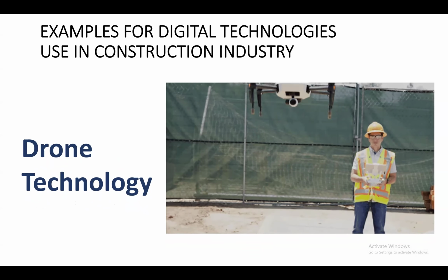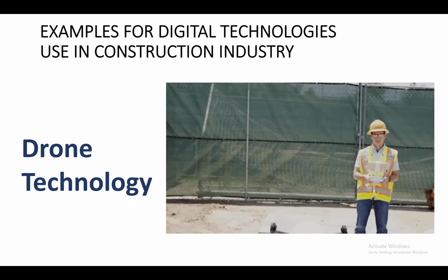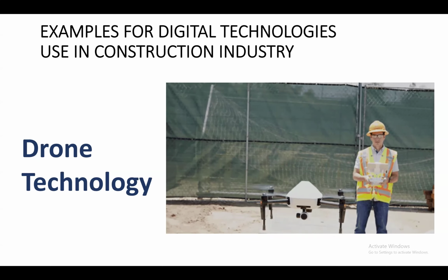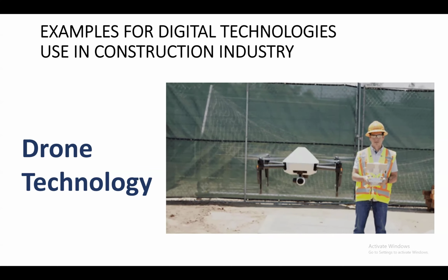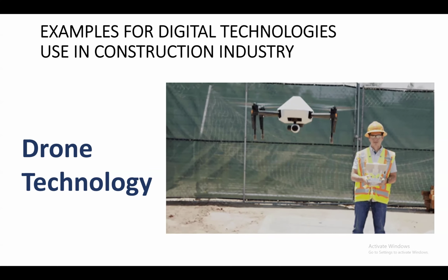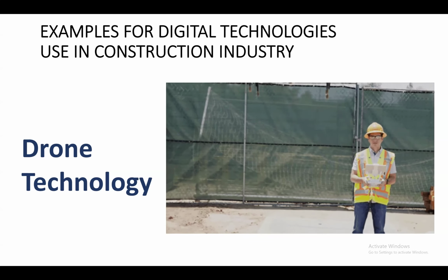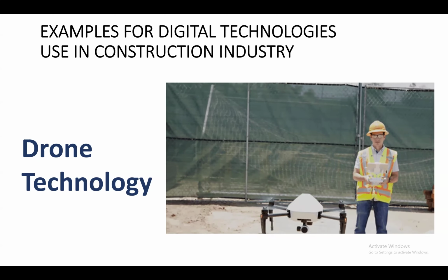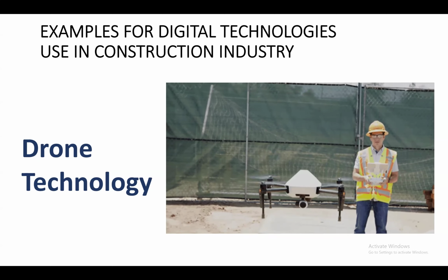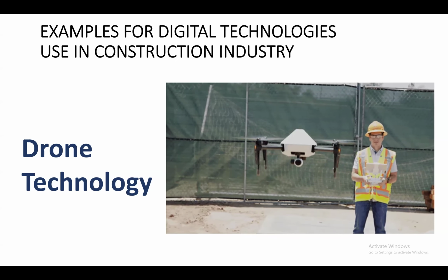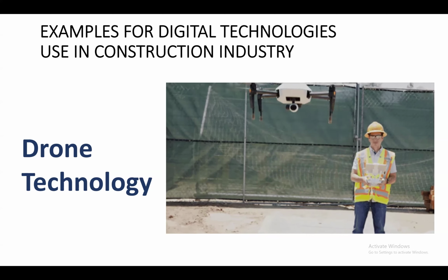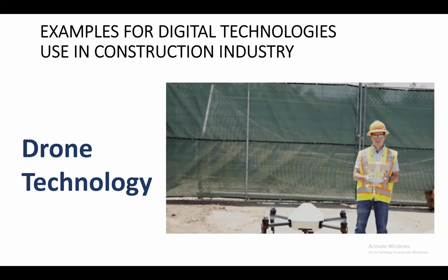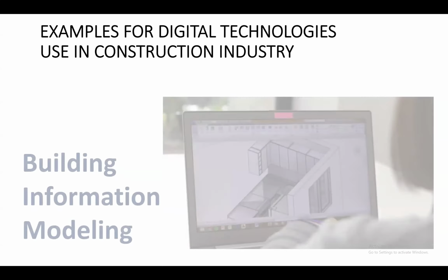Then drone technology. In Sri Lanka, we mostly use drone technology for wedding photography and traveling. But in other countries, they use drone technology for construction. You can use drone technology for construction monitoring, and you can create as-built models. You can capture your construction site, and based on that you can develop 3D models and record your progress. So this is very important. A lot of countries use drone technology in the construction industry.